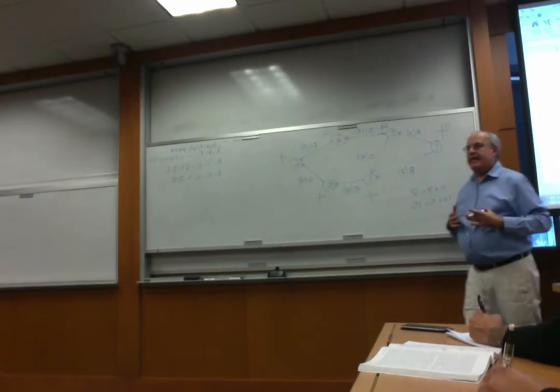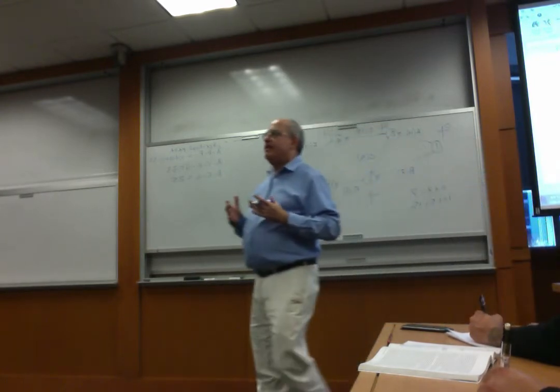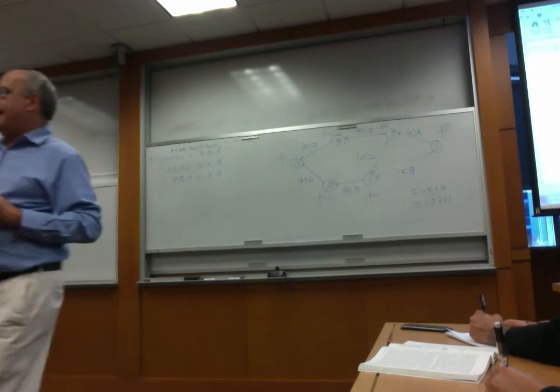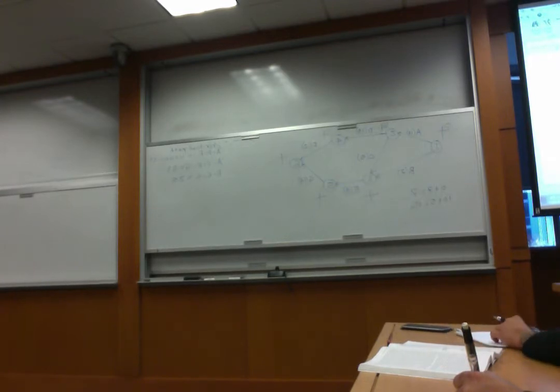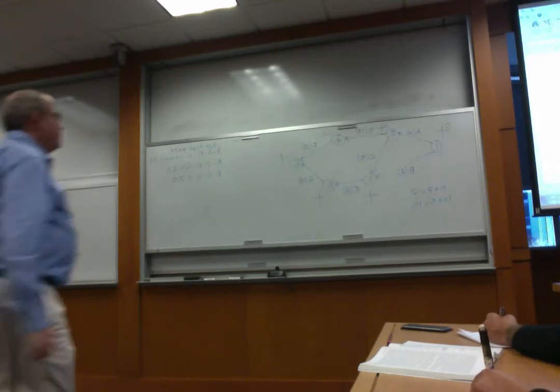Now, remember what I said. What is our objective? To figure out what is the longest path. Since we're looking for the longest path, when we have more than one option to get to a point, which number do we choose? The longer one. So we have to write either 7 or 15. Which number do we choose? 15. Because again, the idea is to write the longer one.